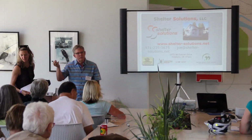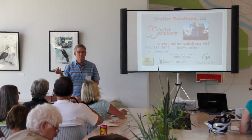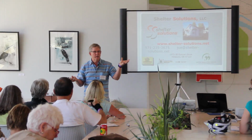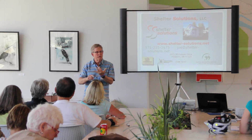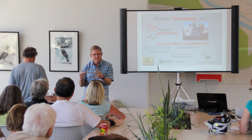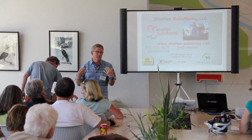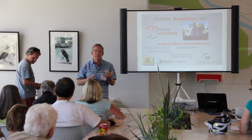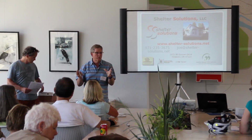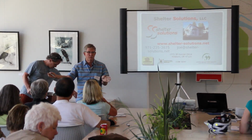The other thing with ADUs is they're small structures. So the cost per square foot of an 800 square foot ADU is going to be way more than a 2,000 square foot house, because you have similar components. You have kitchens, bathrooms, permits, site work, all those things are just in smaller spaces. So with my experience and my historic data from ones I've built, you mentioned 600 square foot. That's going to be in the 140 to 150 dollars per square foot range in cost, and that's everything in the city, permits, finishes and design.